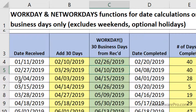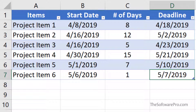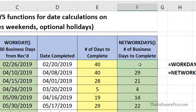So now we have a better look at what is actually 30 business days from the received date. The Workday function would also be helpful for other applications, such as creating a reporting timetable or building a simple project timeline. It's good to know the Workday function does not count the start date when it shows its results.